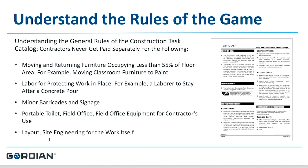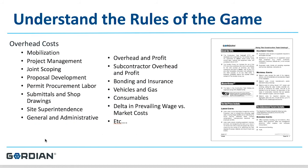In your factor, you need to include cost allowances for a portable toilet, a field office, or field office equipment for the contractor's use. Layout and site engineering for the work itself will not be paid separately — that calculation needs to be in your factor.